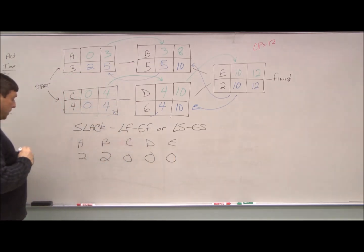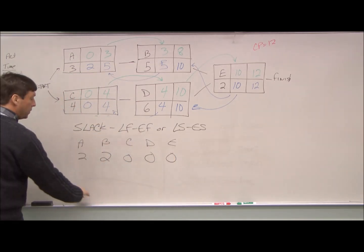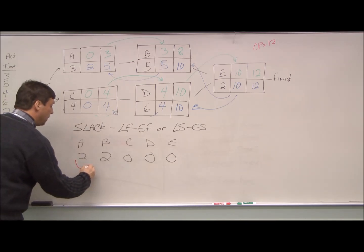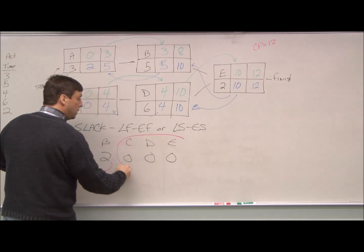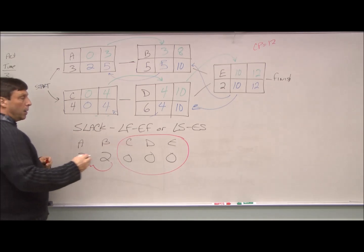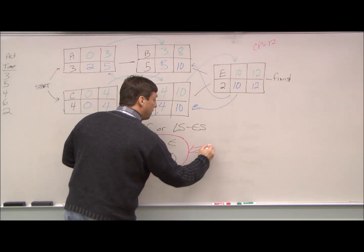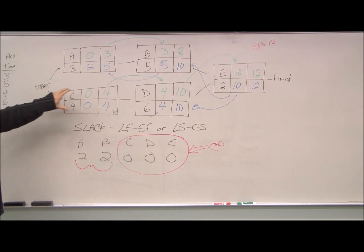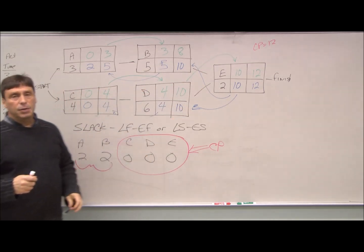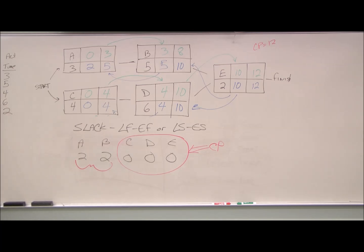So what this is telling us, first of all, is we have two weeks of slack in these two operations. Second thing it's doing is showing us our critical path. Because we have zero slack, and by definition, that has to be our critical path.